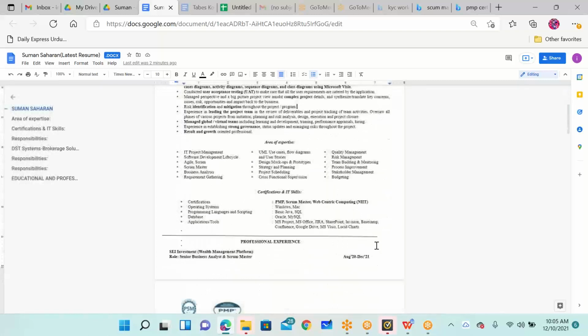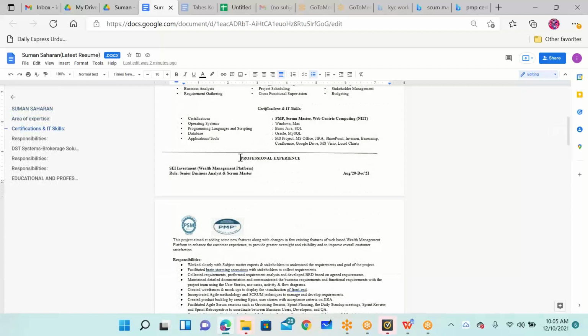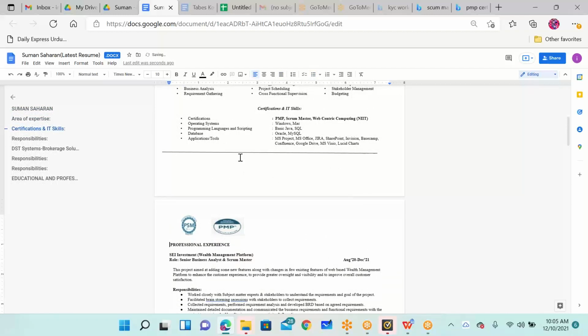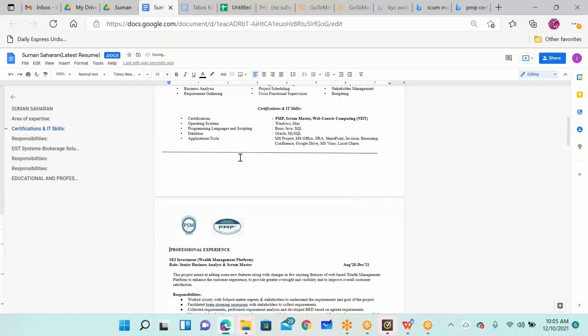One more thing. In waterfall we make FRD, right? But in agile we don't make FRD. So how do we proceed after gathering requirements, if we want to tell them how to break down this requirement? We have a product backlog with the epics. Epics are broken down into user stories, and then you have to work on a user story specification document to gather more information on that one-liner. Your product backlog will have only one-liner user stories, and then you have to document it into the description part and then put it. Okay.